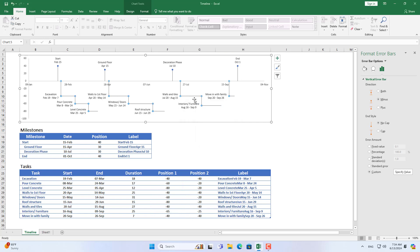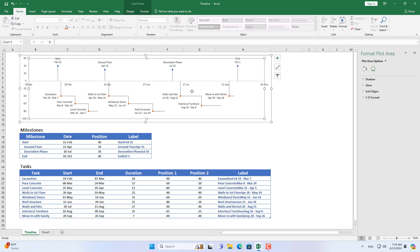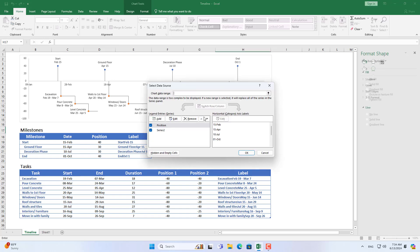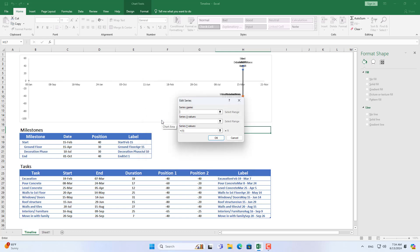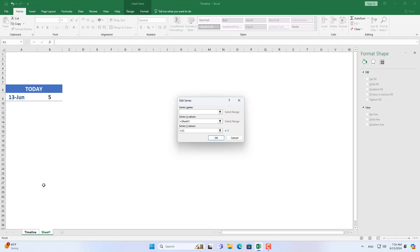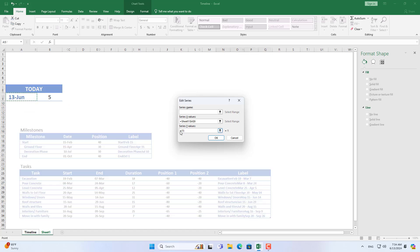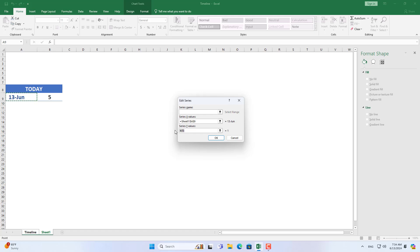The chart above shows you how tasks are related to each other. Now I add the current day timestamp on the chart. Today's date tells you what stage the project is at. On the chart I add today's date as follows.